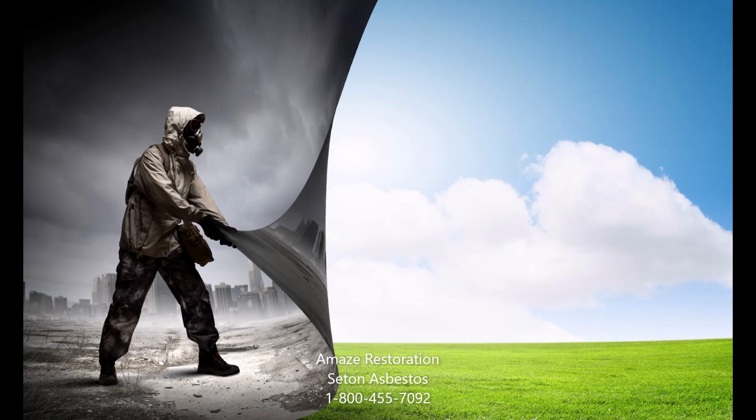Seton Asbestos Inspection. An asbestos inspection should always be performed by a certified professional because they have the proper training and equipment for the procedure. An asbestos inspection will begin with a visual inspection of the area and building materials involved. Certified inspectors know what to look for and how to examine materials with minimal disruption to the material. A typical inspection can take up to 3 hours depending on the scope of work. If the inspector suspects that a material or materials may contain asbestos, they will then carefully extract a sample to take to a government-approved testing facility for further analysis.